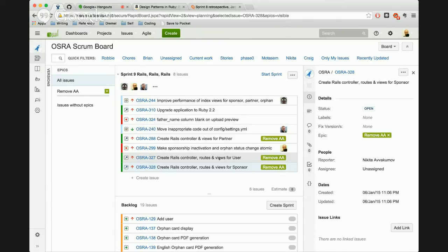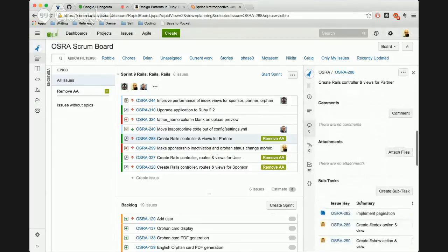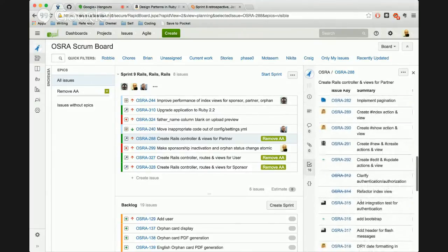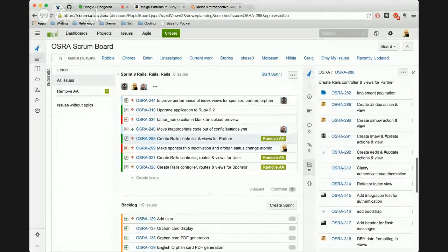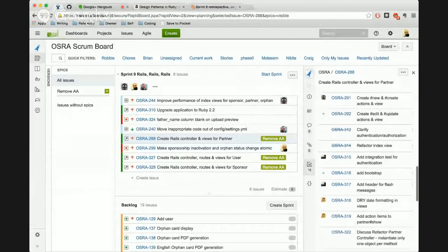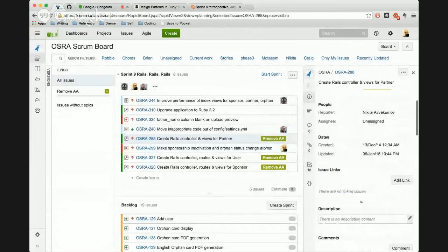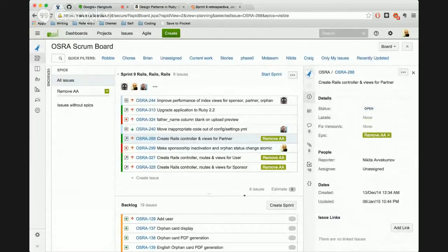If I can add something, a lot of the tasks that were under 288 were things where I was working on one thing and realized we needed something else, so I made a task for it real quick. If you guys are working on something and you see something missing, just take 30 seconds and make a task for it so we don't forget about it, so somebody else could start working on it. Yeah, very valid point.